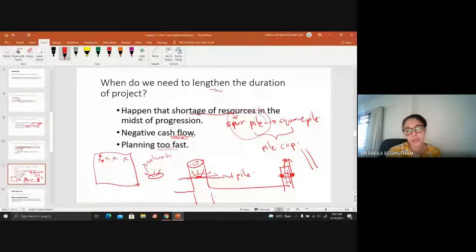So it's like chicken and egg lah. Okay, so basically very important when you are the planner, when you are actually drafting the schedule, the input should come from the site production. You need to know what is the most reliable or closest to correct estimation of the duration.